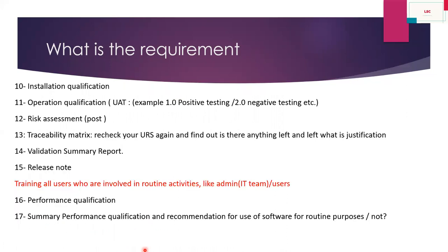The functional specification covers software functions; the configuration specification covers your user requirement configuration. After that, provide training to all users who are going to be involved in the validation activity. Then perform Installation Qualification and Operation Qualification. During Operation Qualification you can include UAT (User Acceptance Testing) — positive testing, negative testing, etc. After that, perform a post-risk assessment: compare the URS with the current RPN numbers to see if the risk priority number has been reduced from the previous assessment. Then review the Traceability Matrix to check if anything in the URS was missed.